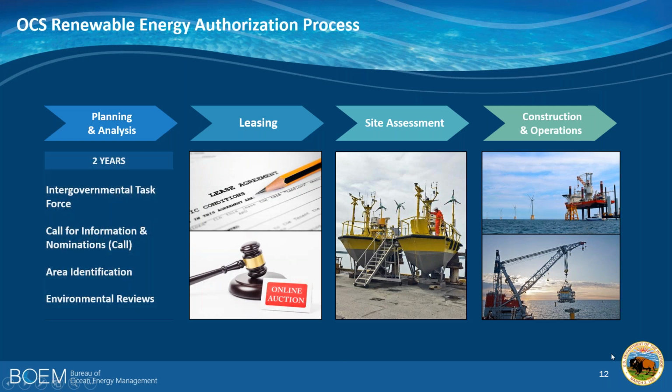And we have established intergovernmental state task forces in most of the East Coast states, as well as California and Hawaii, and I think Oregon as well. And the process begins with collecting information through these state task forces and contacts, and identifying areas where we put out a call for information and nominations, and identify an area consistent with the information that we have and the desires of the respective states, and do environmental reviews on moving forward with conducting a lease.